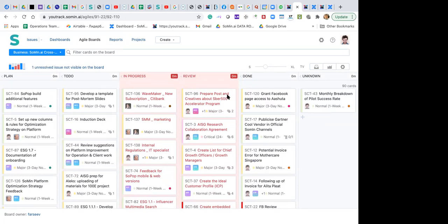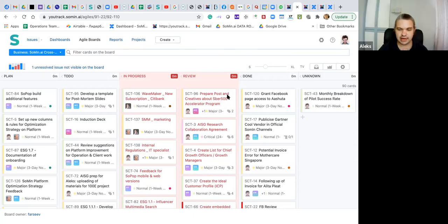Right. Then another question: say the estimated date I set as 23 of February, 5 days from now, then the date is different. Estimated time is how much physical time a person needs to spend, as the date is a deadline for the task.